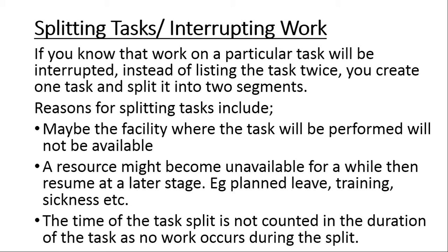On the calendar, that task will be spanning for 8 days, the 3 days duration plus the 5 days of the split. But on our project plan, the duration of that task remains 3 days because that is the time that we are actually working on that task.